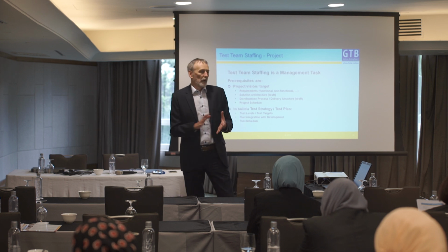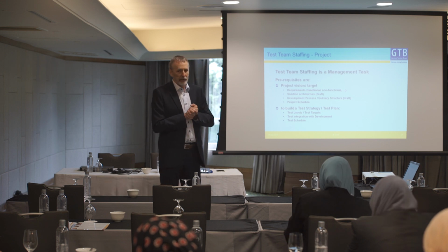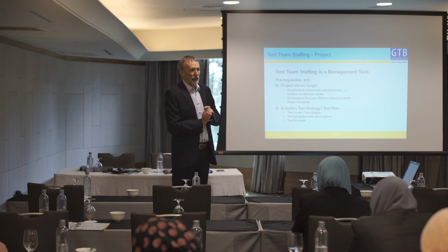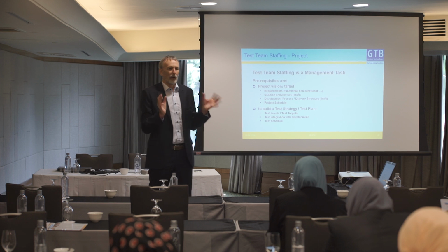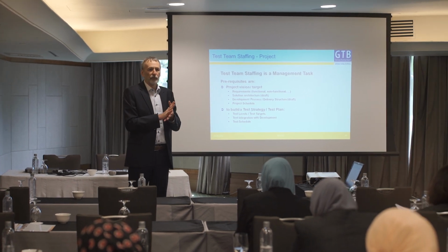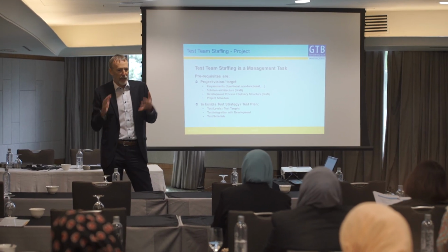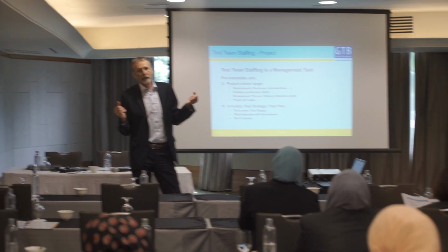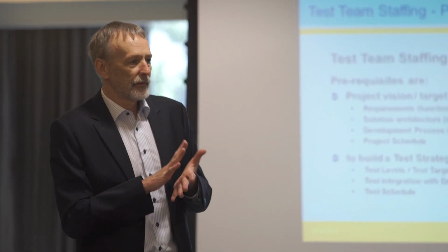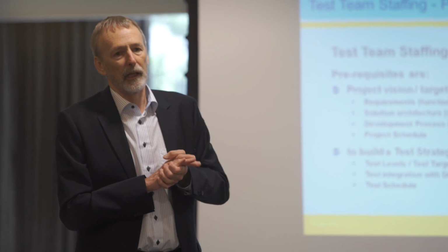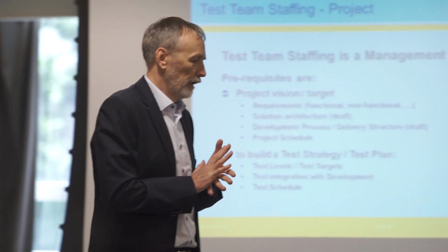That's the basic. What you first have to do is build a kind of test strategy, a test plan, because you have to build up the map, your landscape of work to do, and then you can look for people to do the work. You need a test plan with your test levels, with your targets, and also with your schedule to do the tasks for the different levels of testing, like integration testing, system testing, and so on.